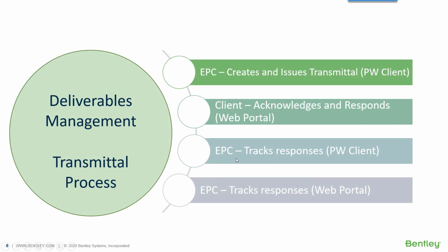Just so you know, in Bentley, a transmittal is the package that we issue, the outgoing package. A submittal is the same package, but the one that you receive. It's an incoming package.